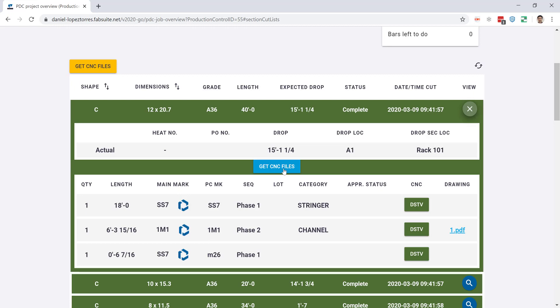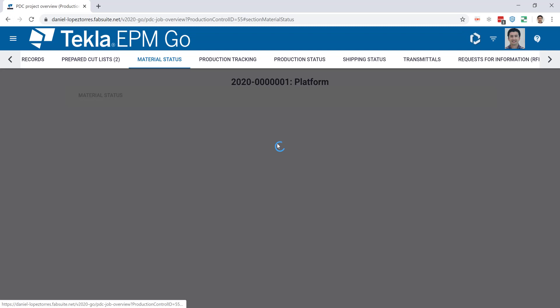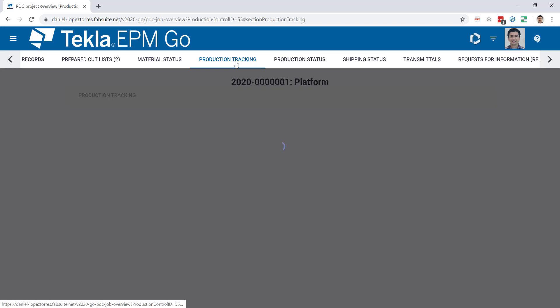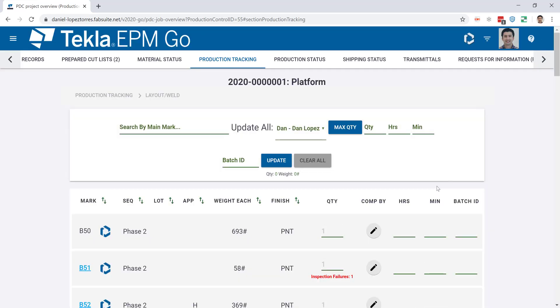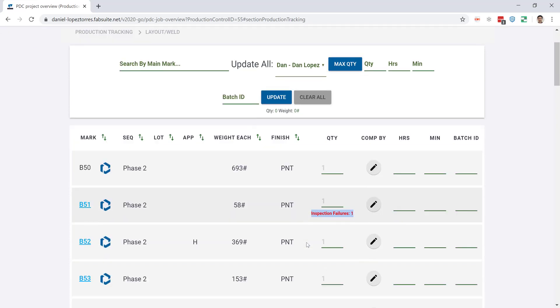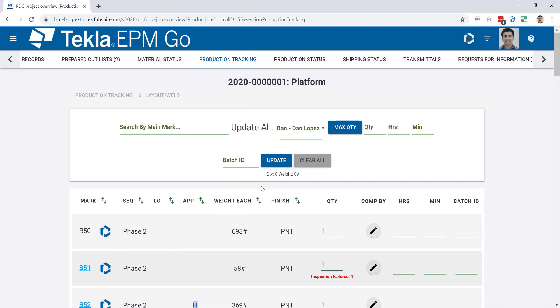Also, the material status is available and you can clearly see in a quick way how much has been taken from the stock, how much is waiting to be cut, waiting to be received, or even waiting to be purchased. Tracking the fabrication and erection and getting real-time information is probably the main purpose of EPM Go. Here you could also identify pieces, like if I go here to the layout weld station, you can see the B51 assembly has some inspection failures on it, and also the B52 is on hold. So all this information can save you errors and time on the shop in pieces that don't have to be fabricated at that moment.